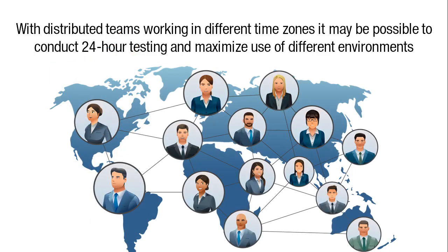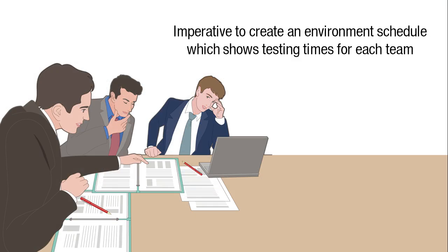Also, with distributed teams working in different time zones, it may be possible to conduct 24-hour testing and maximize the use of different environments. Therefore, it is imperative to create an environment schedule which shows the testing times for each team.